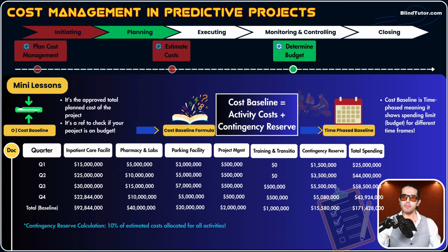And when we come up with cost baseline, we provide it to our project sponsor and high-level decision makers, and they need to approve it. Once it is approved, a lock goes on it. It will be frozen. So any change to that baseline will go through what? Formal channels, the integrated change control process. It acts exactly like scope baseline and schedule baseline.